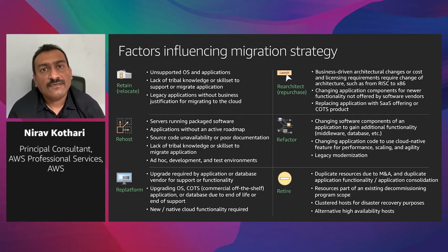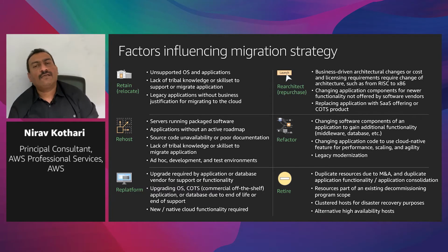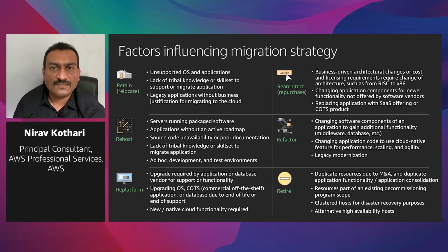Or imagine a business need for new native cloud functionality. Any one of those are good enough factors for you to consider replatform as your migration strategy. Swapping out an operating system, changing a database engine, are good examples of sort. So if you're thinking of doing any one of those for a given workload, replatform is the migration strategy you want to start thinking about.